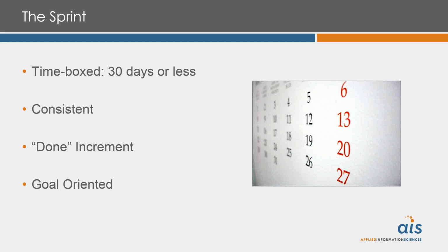They're also goal-oriented. So while we may have this backlog very long and explicit about the features that we want, we'll often take those and compose those, maybe the most important or most valuable 2 items from a financial or a cost perspective, with some others that are maybe not as cost beneficial or revenue beneficial. We'll put those together to tell a story to our customers. And that's what we mean by goal-oriented. We want to have that goal in mind the whole time we're executing on our sprint.